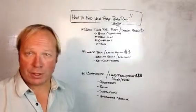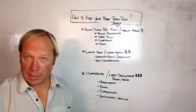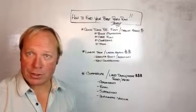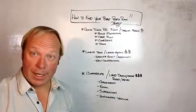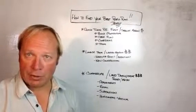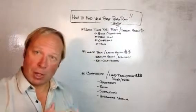are literally taking 4 to 6 months to get just through the review period. And then basement dig outs, to add square footage in the basement, those can take 2 or 3 months extra over and above. So the more involved additions, if you're adding a garage or if you're adding an addition to the existing structure to expand the floor plan on the main level, those all take time, so you need to take those into consideration, but the margins are larger.